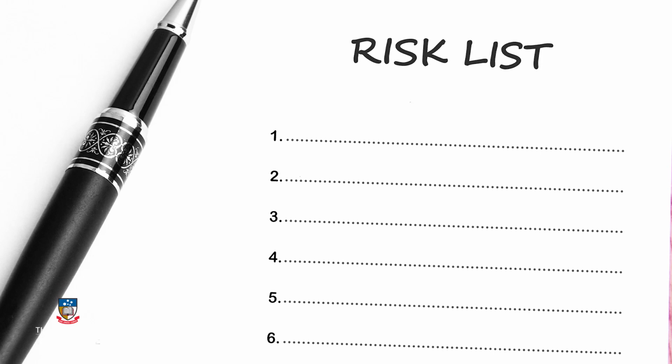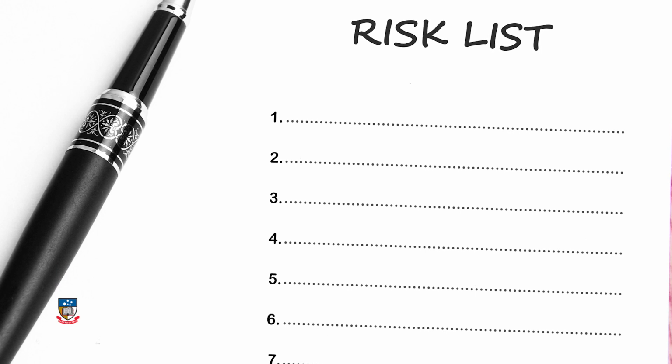You might also want to consider using checklists to enable you to identify risks for your project. Checklists for risk identification can be developed based on historical information and knowledge that has been accumulated from similar previous projects and from other sources of information. One advantage of using a checklist is that risk identification is quick and simple. One disadvantage is that it is impossible to build an exhaustive checklist of risks, and the user may effectively be limited to the categories in the list.